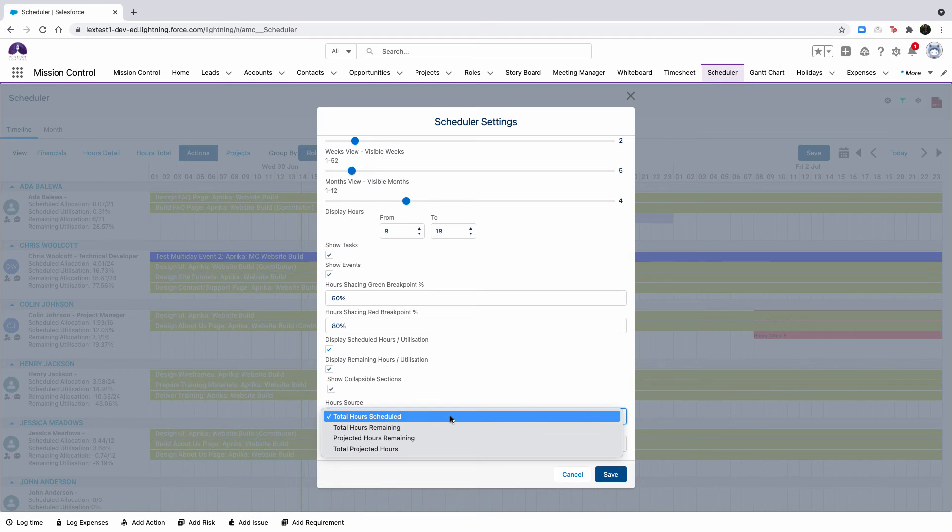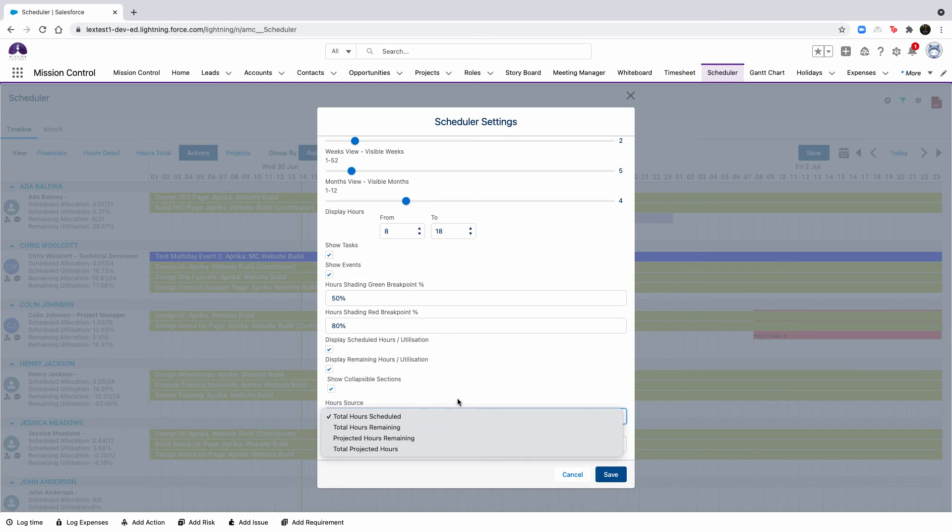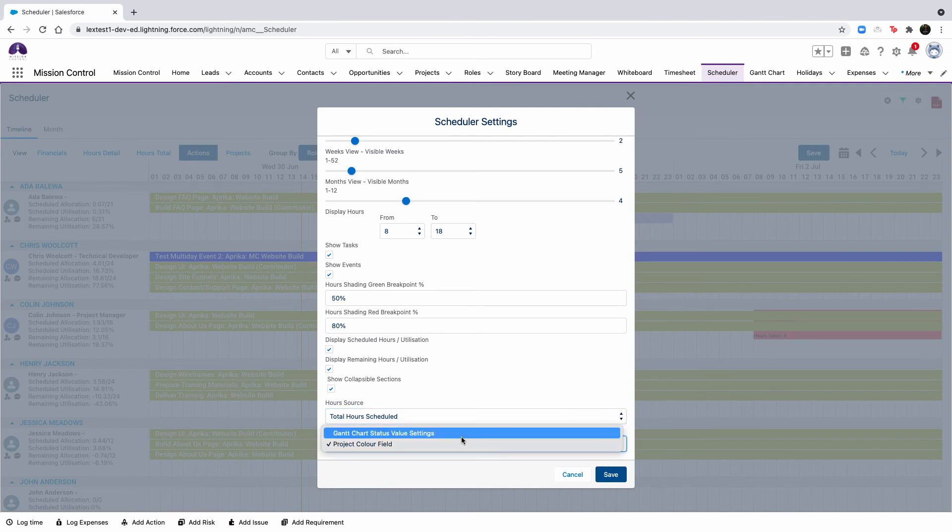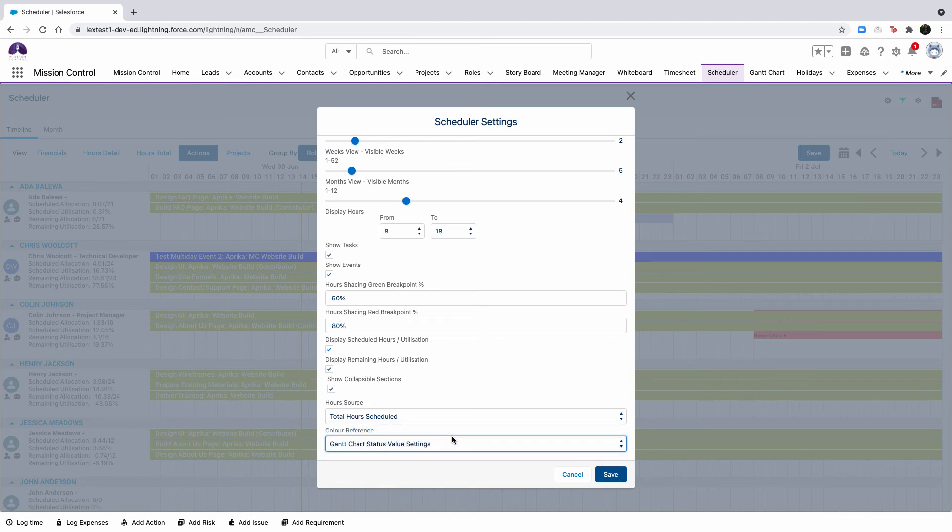By default, the scheduler uses the total hours scheduled as the data source for displaying capacity and allocations. You can also adjust this to hours that will be used by choosing one of the following options. You can set the hour source to the total hours remaining, projected hours remaining, or total projected hours aside from the total hours scheduled. Any option that is selected here will be used across all views within the scheduler. We now have a color reference field that specifies whether the color of the action on the scheduler is driven by the project color field or the color specified in the Gantt chart status value settings. This feature was included in the 1.58 release.